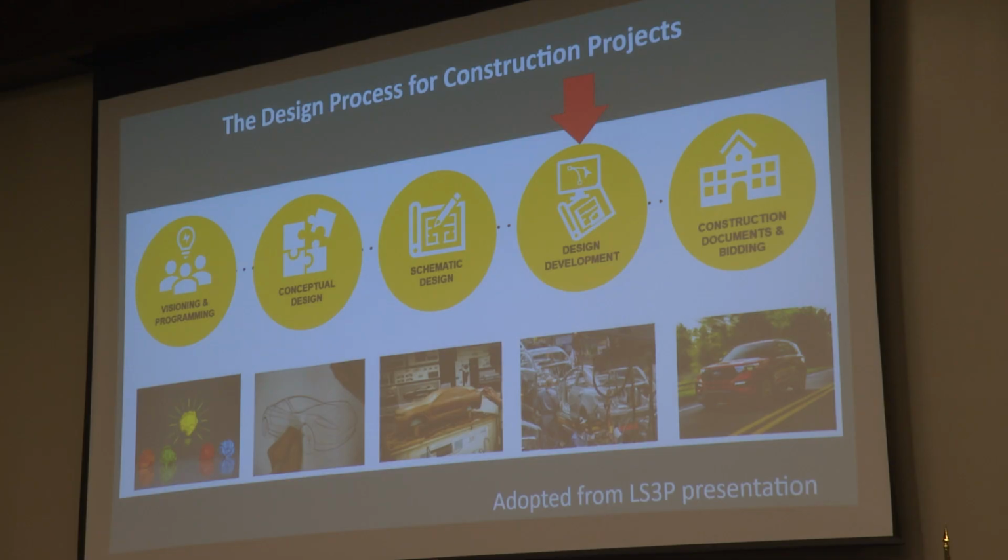What happens at the bidding stage? The bidding stage is, we do a pre-qualification, and then all the contractors are there, and they all kind of see who's going to be bidding. The intent of that is to make sure we have qualified contractors, but also that they can see who's bidding to help drive that price down.